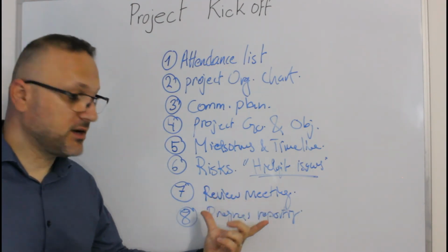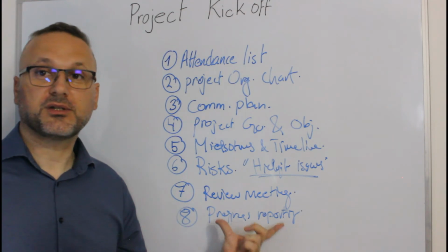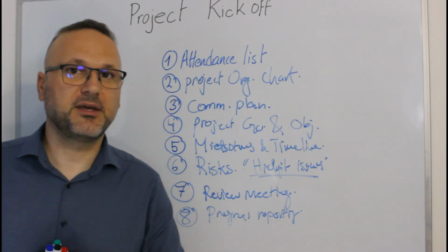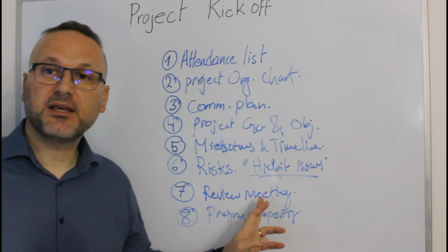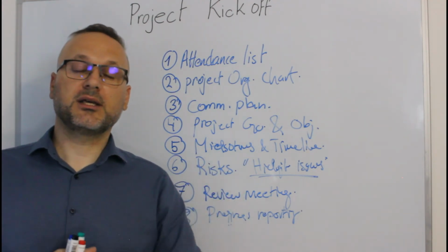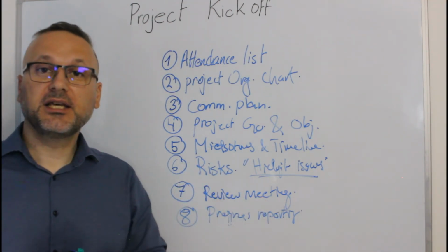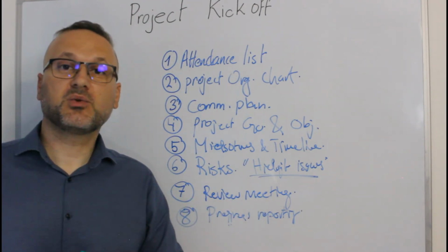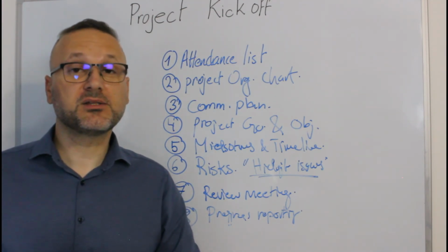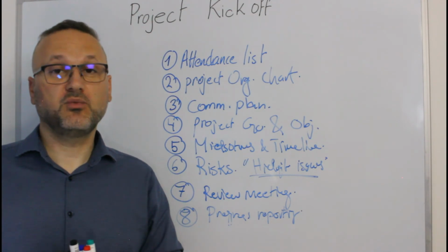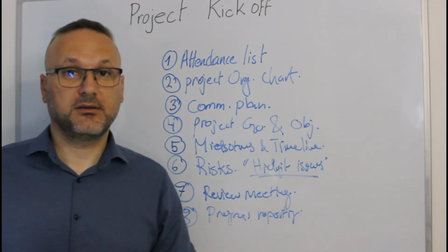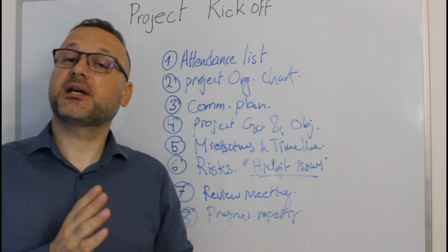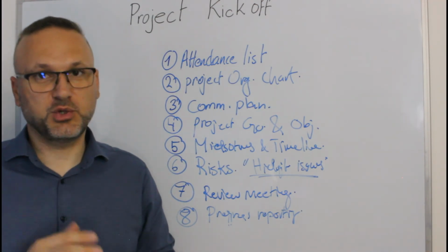It's for reviewing your progress reports, if they are required in the contract, and if they are not required in the contract and you for some reason are not preparing the progress reports, then a review meeting is a must, to be set at intervals for the project to review the progress. The review meetings will have minutes of meetings which are signed, and then we can say, okay, the signed minutes of meeting during the review is considered as our official report reviewing.